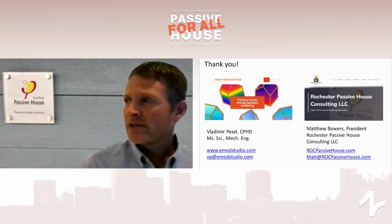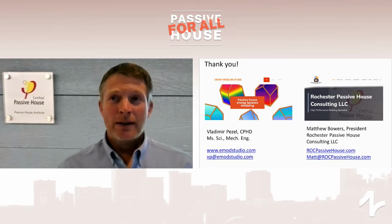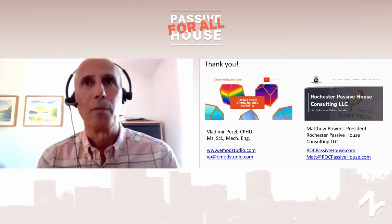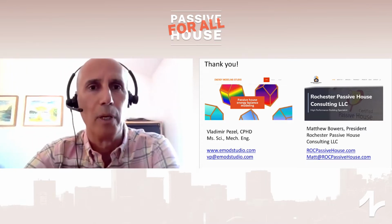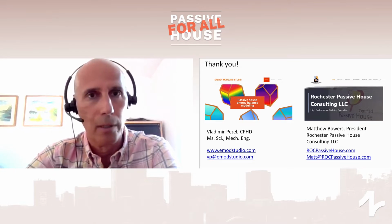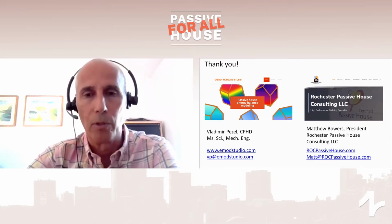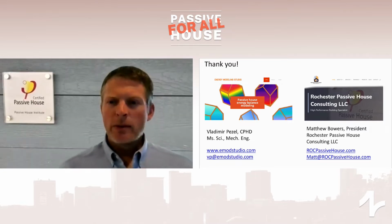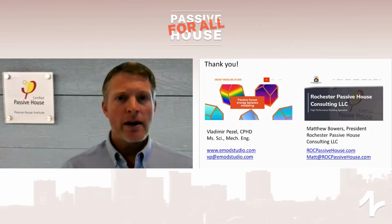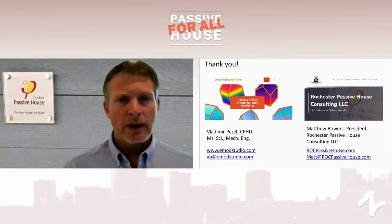We had a question come in from Scott about how long certification takes. Go ahead, Vlad. How long did your process take once you submitted everything to the certifier? Once I submitted everything to the certifier, I think it took not even 2 months. I think I submitted end of August, that was 2020, and in October I received a positive answer from them. But that also depends on how complete your documentation is, if you've made any errors in your PHPP or anything like that. So it depends on how much back and forth you have with your certifier. I would agree with that. I would say it's probably about 2 months until you get the plaque, if everything is good to go, you've submitted all of your documentation correctly to the certifier, and it's a smooth process.